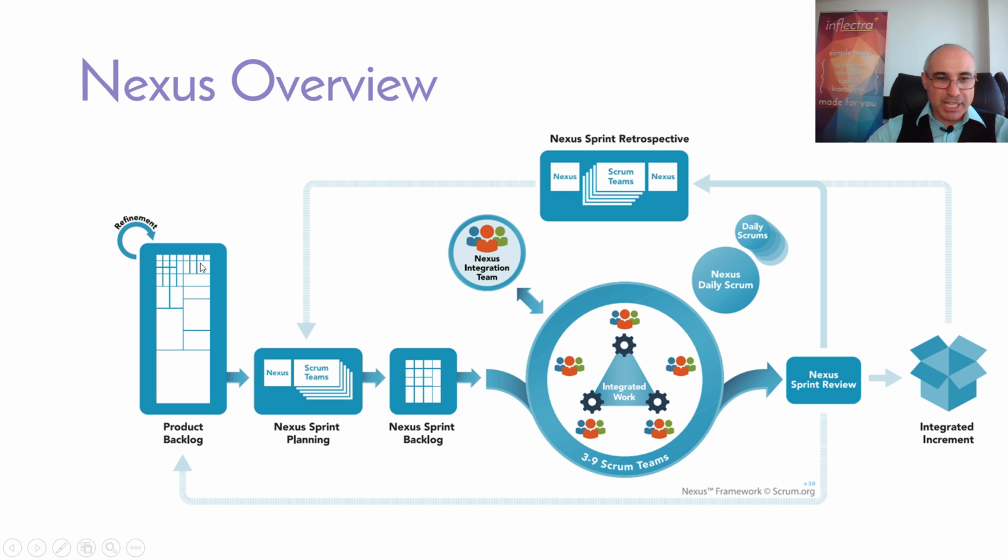And what you're doing is the product backlog is for multiple teams. So instead of having a backlog, one for each team, that's completely independent, you now have a combined product backlog for the entire set of different teams, and the teams work together to refine it. Each of the Scrum teams themselves will take that overall groomed backlog and take the most important items that belong to their set of functionality, and that forms your sprint backlog for all the different sprints that are in that nexus, that group of related teams and products. And now all the teams are working together, and the work they're doing is all integrated. So Nexus is really geared towards a program concept where you're working on one large system of systems. It's not like a portfolio where they're all separate.